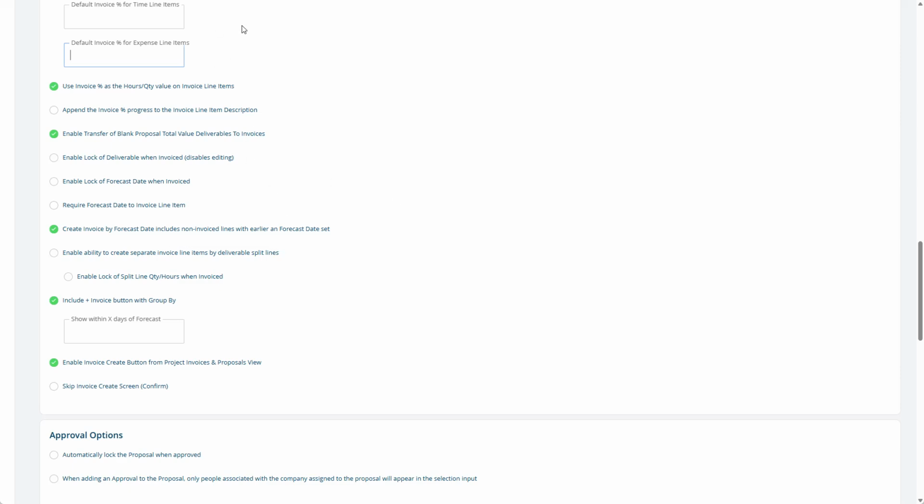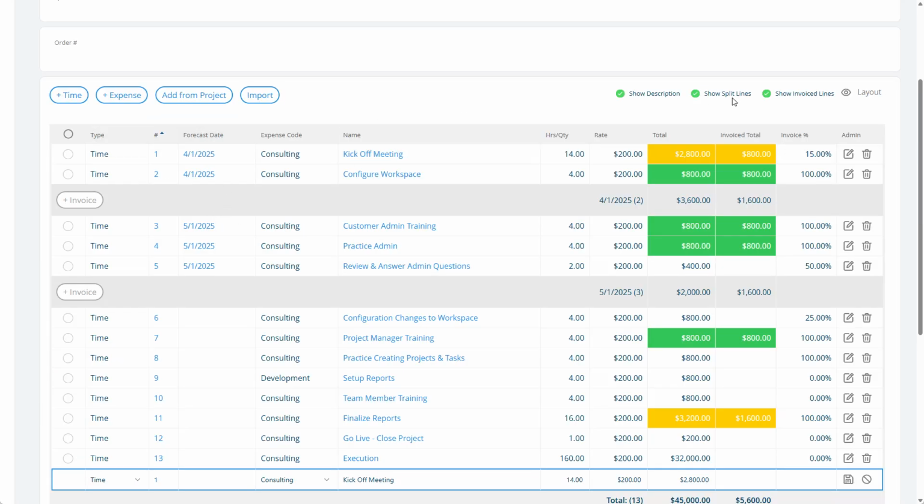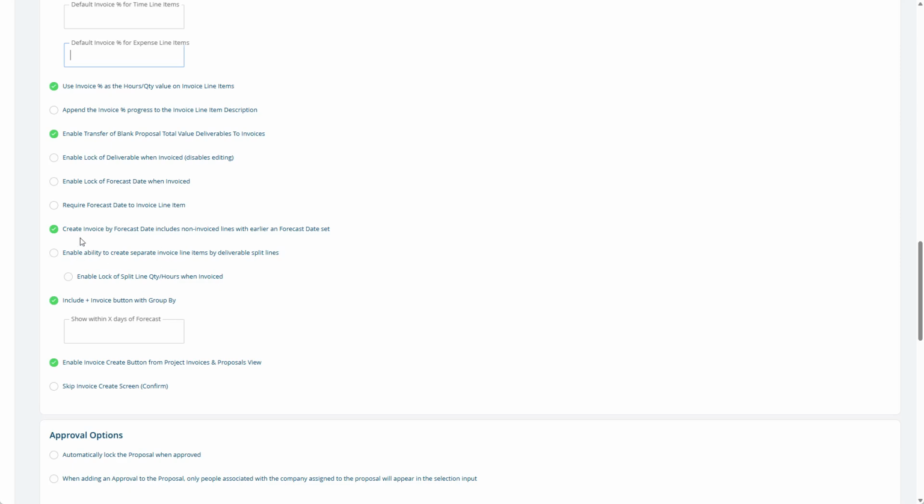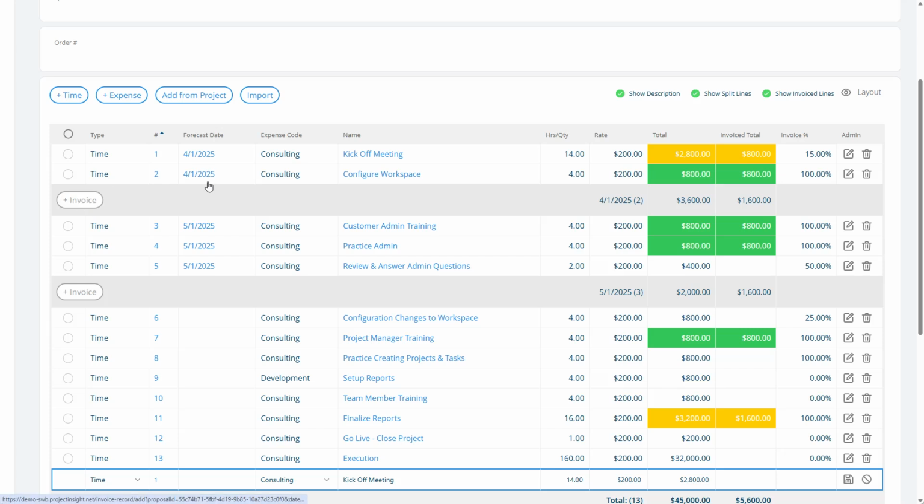So let me just talk about forecast dates. On your proposal, you can put a forecast date of when this line is going to be invoiced. And there's even an option to split the lines if it's going to be part in one month and part in another month. There's other videos for that. But the option I'm describing means if I click this plus invoice, it will invoice all of the May lines and all of the April lines. If this checkbox is not on, then this plus invoice will only create an invoice for April, and this plus invoice will only create an invoice for May.